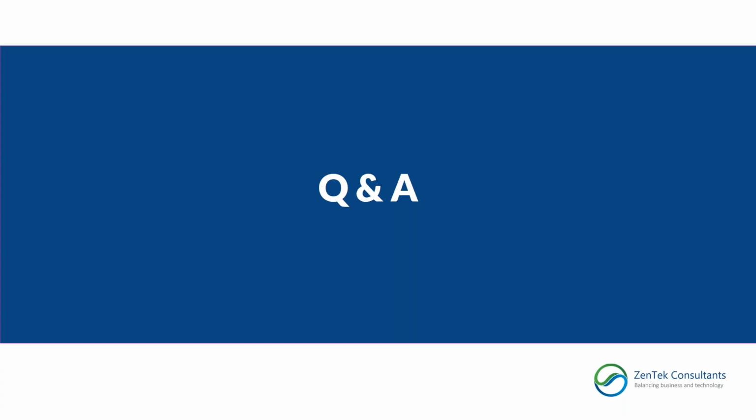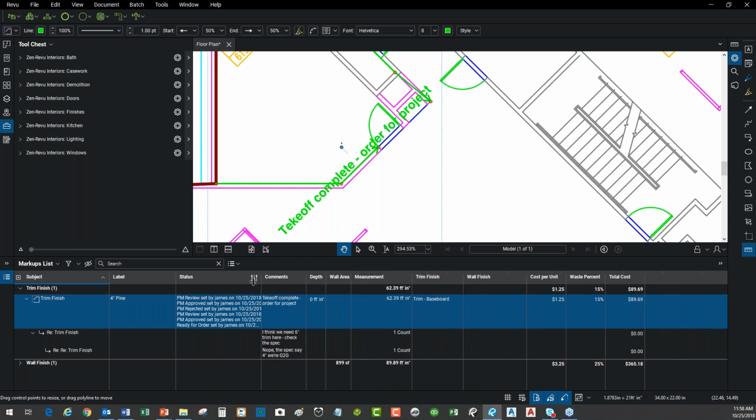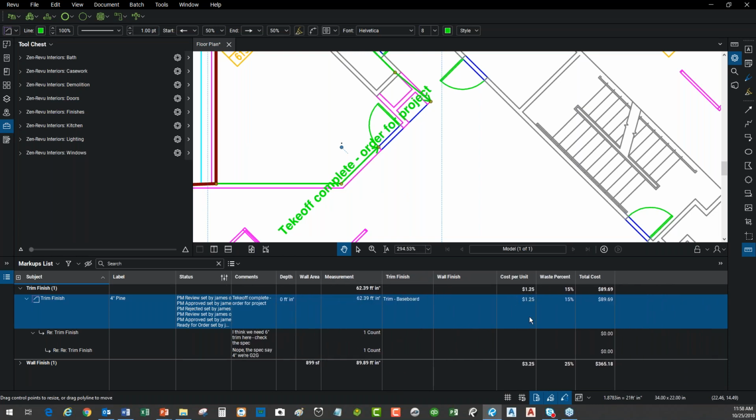And one other question here I got from Jorge. Jorge wants to know, can I add column formulas for calculating supports for pipes and conduits? Oh, okay. Yeah, absolutely. You can actually go in with the formulas inside of Bluebeam here, right? When I'm working with the different formulas, just as I'm adding calculations for costs, I'm taking the cost per unit, multiplying it by the measurement, multiplying by the waste percentage and getting values.